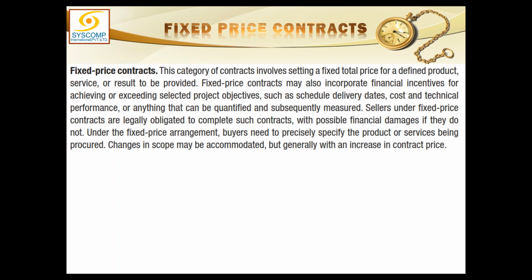In a firm fixed price contract, this category of contracts, these are called fixed price contracts. This category of contracts involve getting a fixed total price for a defined product, service or result. What I have done is, I have asked various people to bid for a job and give me a fixed figure, a lump sum figure.